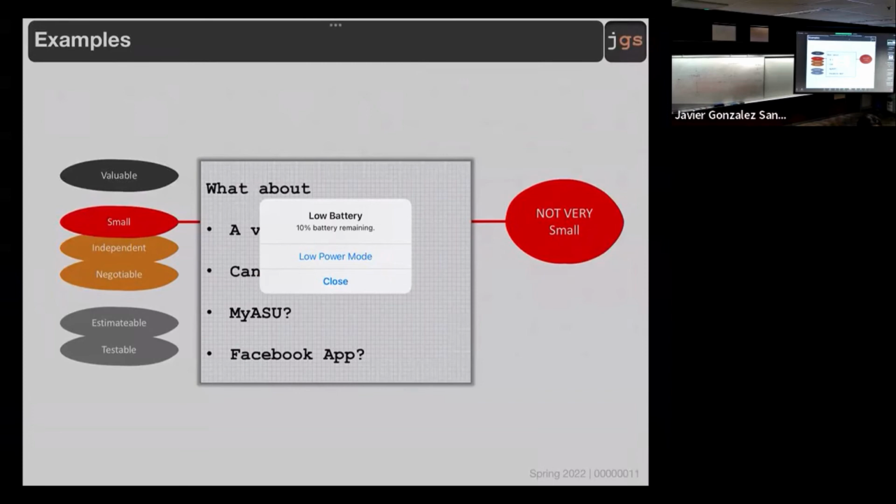Good? Again, something that you can do in a few hours is not a requirement, it's an activity. Something that you can do in days or weeks is a requirement. Something that you need months or years for is probably something that later we're going to call an epic. It is not a requirement, but something that we can use to extract requirements.